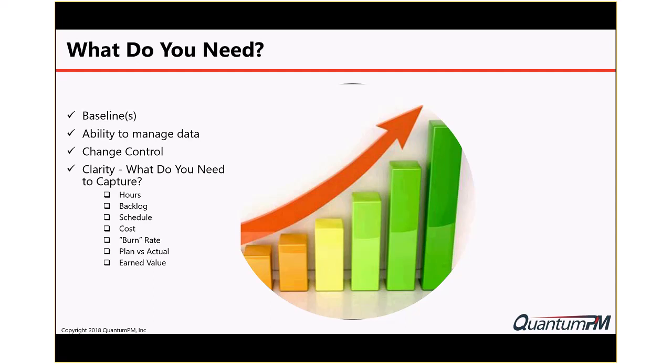So you've got to have a baseline, and you can have multiple baselines. So think about that in kind of a concept of snapshots. Maybe you do one at the end of each calendar month, or maybe you do one when you complete major phases. Different kinds of ways to look at baselines so that you can capture the data that you need. And that all needs to be planned at the beginning as you're launching your project, so you move it forward properly.